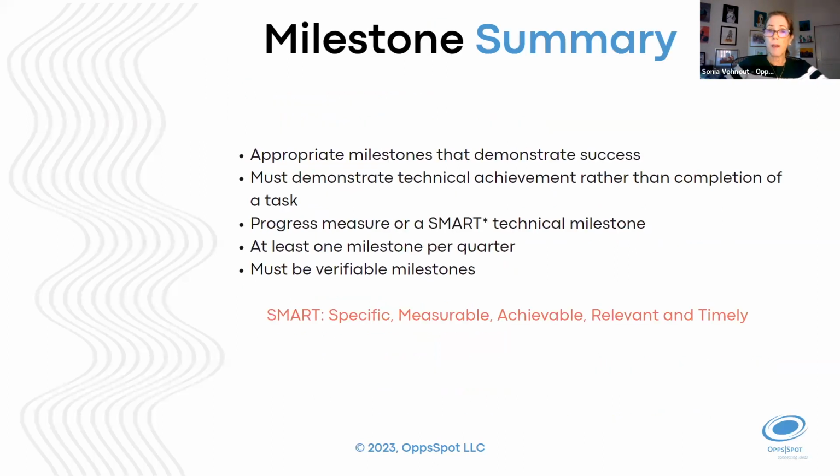You're required to do a milestone summary. So what are your milestones? Outline them such that you use the SMART technical milestone measures and at least one milestone per quarter. And make sure that these are verifiable milestones.